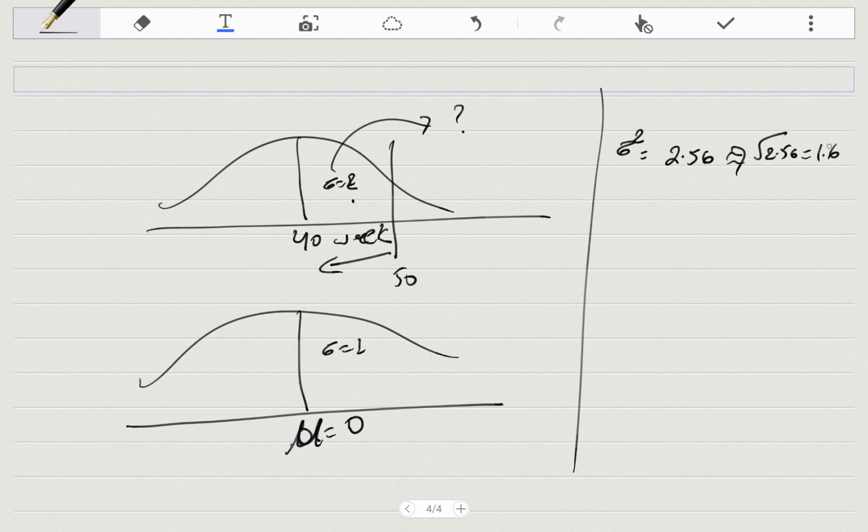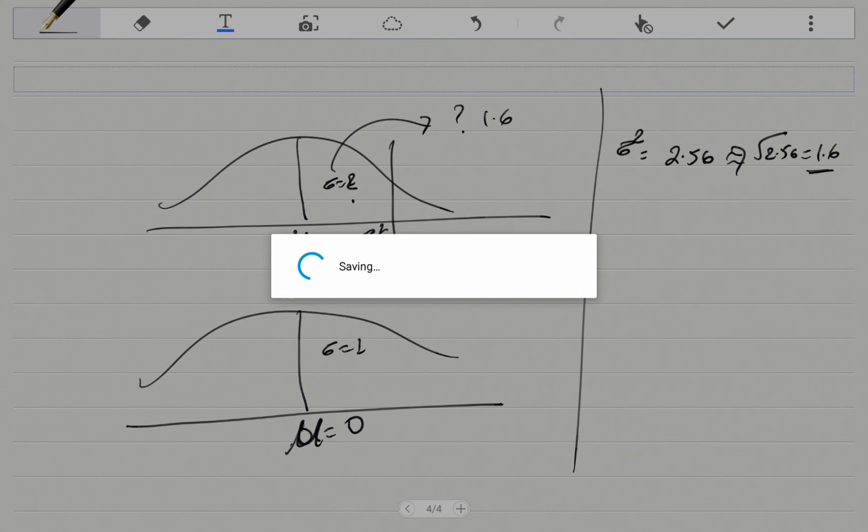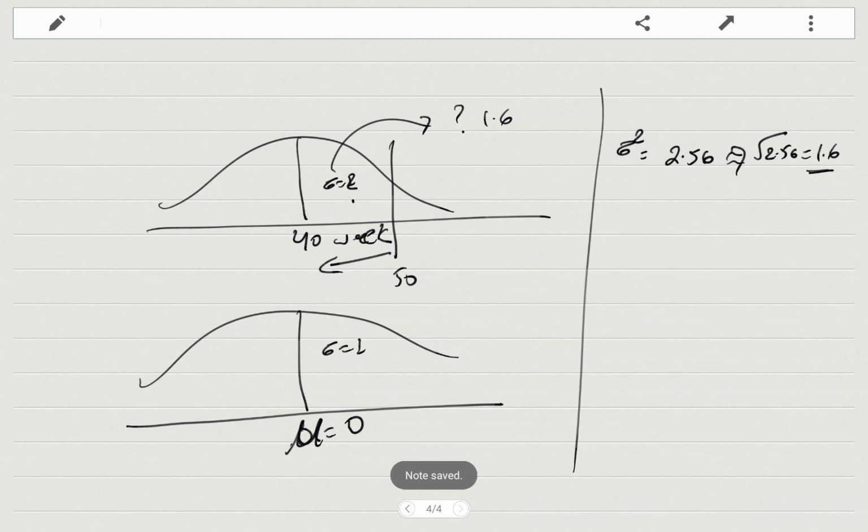Okay, and again, if you had taken the other path, the path with the G, this value would have been smaller. Again, the idea is to take the maximum one. The bigger the standard deviation, you'd penalize the calculations more. That's why we take the maximum one. Alright, we have the standard deviation of 1.6. Now after this, the calculation is pretty straightforward from your basic stats class.